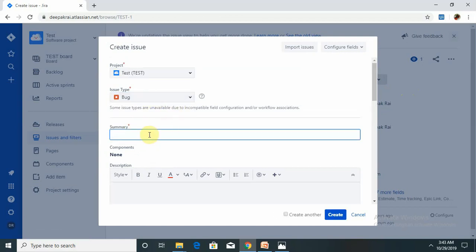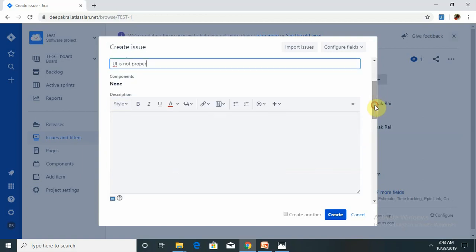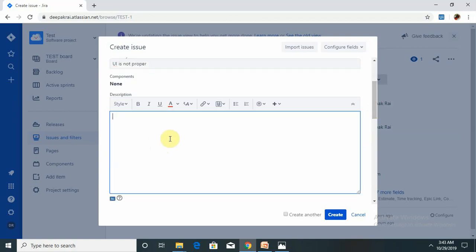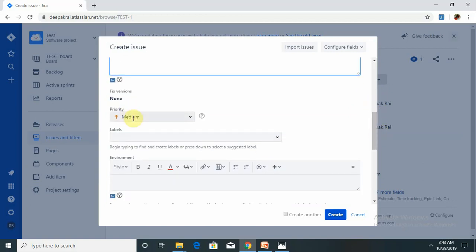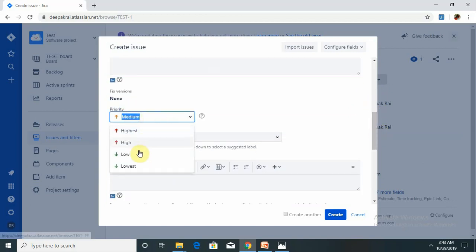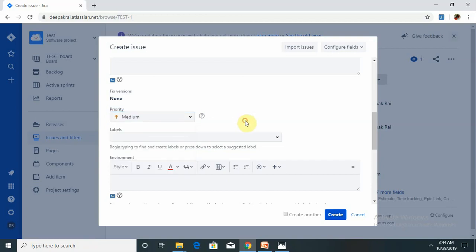From here I have to mention, like UI is not proper - this is the summary of the defect. And here we have to mention each and every step in the description tab. Then there is a priority - there are four fields in the priority: highest, high, low, and lowest. Highest means a blocker as a priority set, so that should be resolved as soon as possible. Then the level - if any levels are added, levels are normally used for the project name or any functionality of that product. So level should be selected from here if it is available.